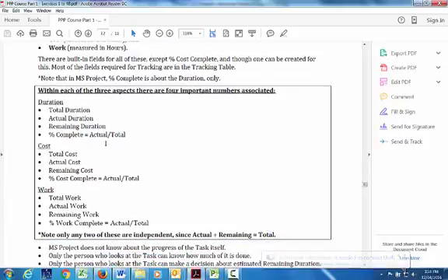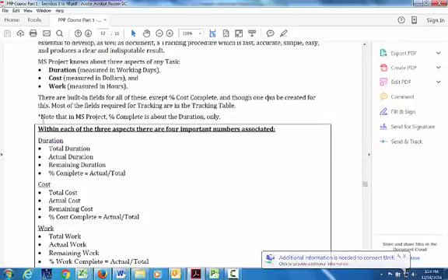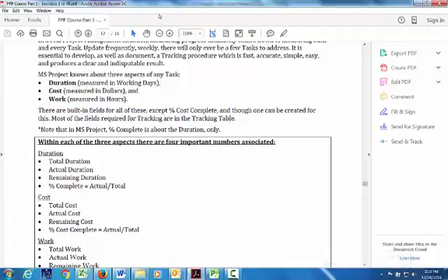Okay, there is a tendency, or if you like, a habit of thinking about percentage complete in terms of work, so the number of bricks laid, and then trying to convert that into duration, when the two only correspond if the rate of work is exactly what you had planned it to be. If things change, like bricks are getting laid too slow or too fast, then work and duration no longer have the correspondence that you set the model up to be. So basically this lesson predominantly looks at duration and looks at a number of tracking rules that mean that you won't get lost. We'll show you how to break those rules and what damage that causes throughout.